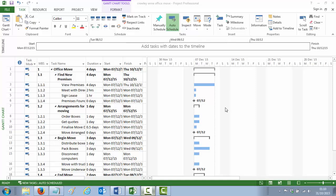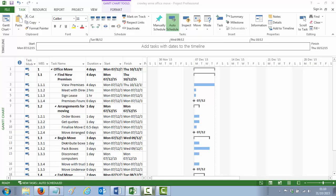The first thing we're going to look at is point number 8 on the Office Move example, which is to attach a note to the Distribute Boxes task to say, remember to label the boxes clearly. If you want to do anything with any task, you should double-click the task. So we double-click Distribute Boxes and we get this dialog box, which has all the information about that particular task.